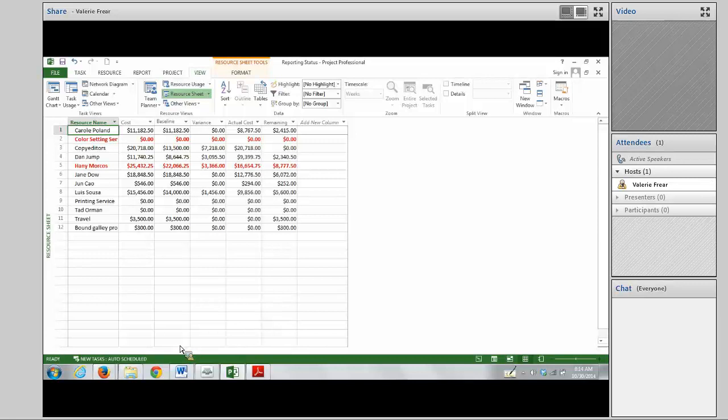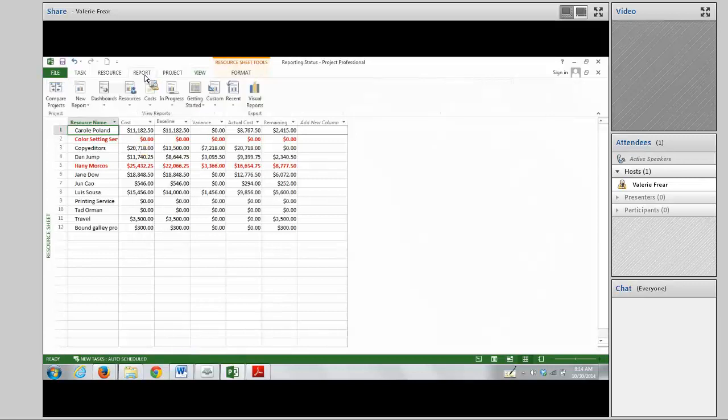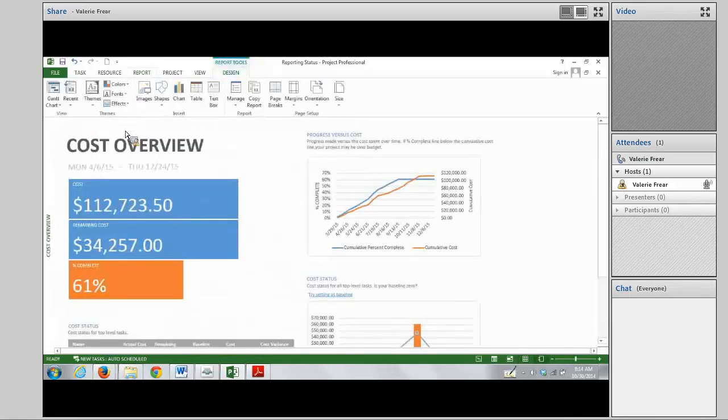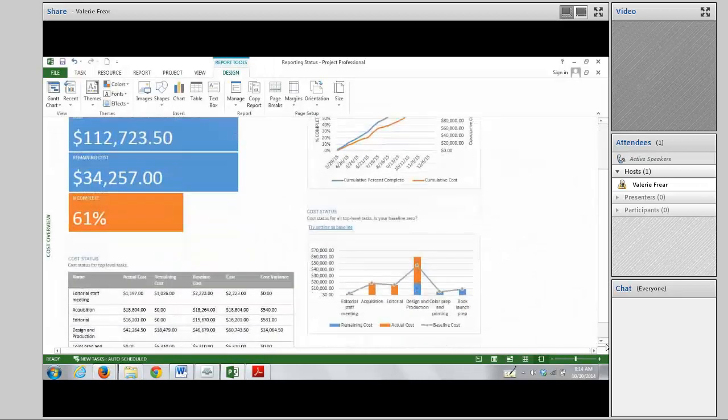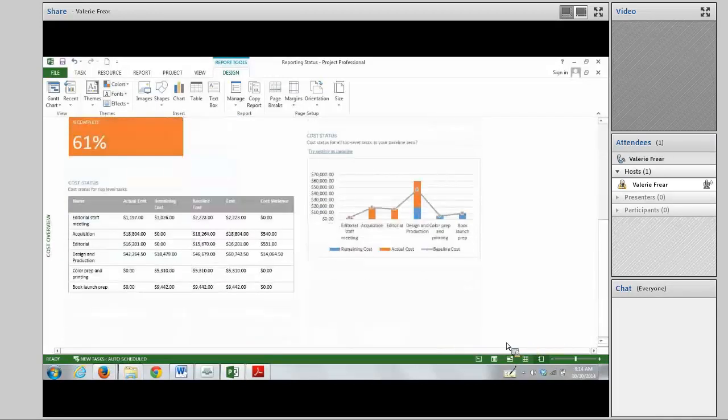So you can use the cost overview report to see resources over budget. So we could go to the report. We can go to view. In the view reports group, which is all these reports here, click dashboards, and then we want cost overview. And look at that. So you can see what's going on. You've got some charts and some graphs here, so you can see what is happening. And these dashboards